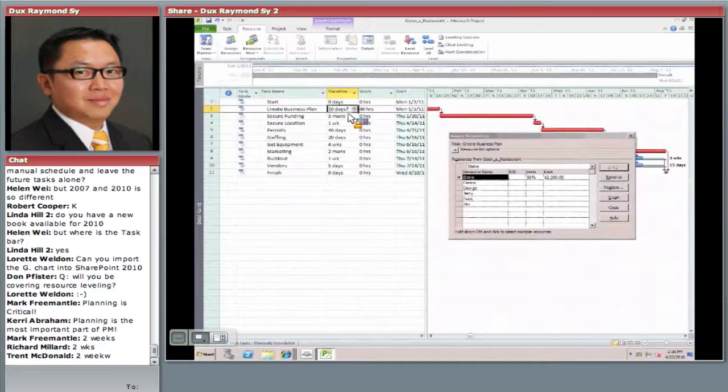Next. And by the way, whenever you see this question mark, that means it's not finalized yet because it's just assuming Elaine will work half time all the time. But what if Elaine's working on other stuff? She can potentially do this in 3 weeks, right? Because she's juggling other stuff. But if it's indeed 10 days, if that's all she's doing, I can click, hit 10 and just make it permanent, okay? Oops, what did I do here? Undo, okay? So next.